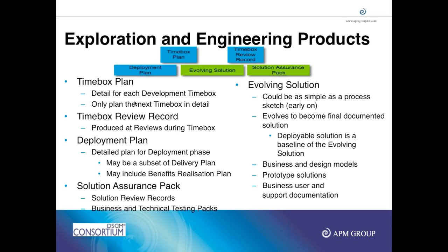What reviews they should conduct, when they should conduct, what they should look at, what benefits to be measured. All of that is actually the benefits realization plan. This is required because we might have delivered a solution that works within time and budget, but if we have not achieved any benefits from delivering the solution, then the project may be unsuccessful.